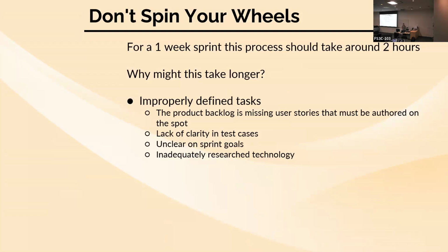Don't want to spin your wheels on this process though. Generally for a 1 week sprint, this takes a team probably about 2 hours to do sprint planning. It shouldn't be a crazy amount of time to get this one done, but it is still a significant meeting that has to happen across teams. So, important notes on this one though, if it does take you longer than 2 hours, the reasons why are